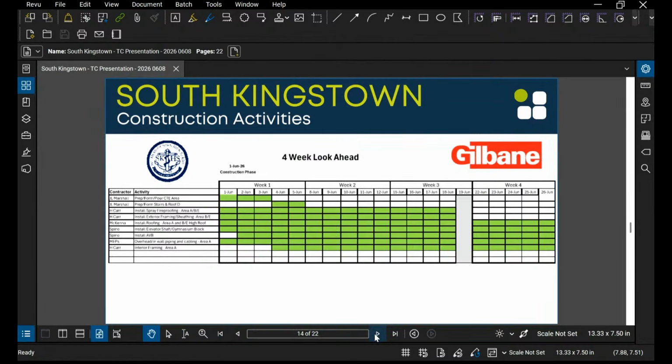So abatement is ongoing. We are looking in probably the next 4 weeks or so to begin the demolition process. We've gotten about 40% of the way done with abatement and air clearances. They're moving their way around the building. Once we get air clearances throughout the building, we'll be able to apply for the demolition permit. So about a month.